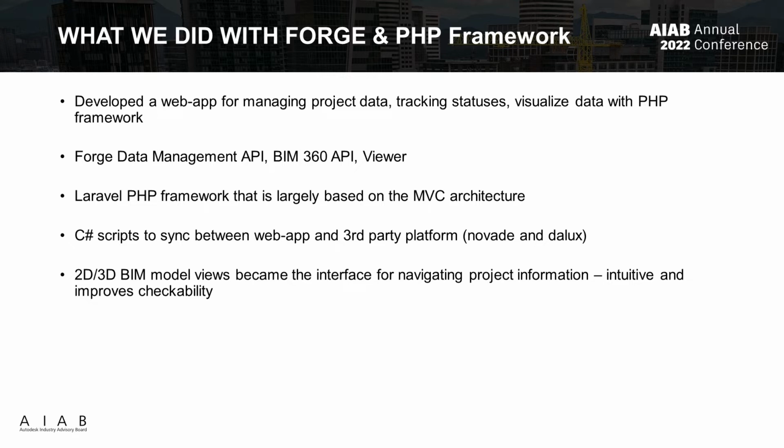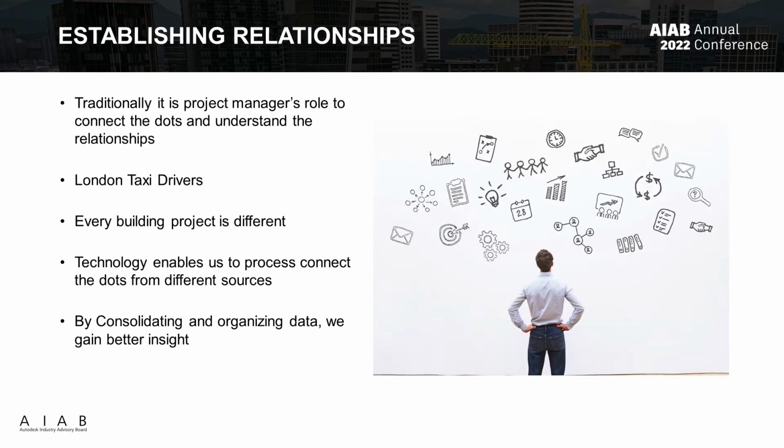We also wrote some C# scripts that synchronize our web app database with Novate and Dalux databases. By consolidating project data on the web app with Forge and C# scripts, the live BIM models that are updated daily by the contractors became a more intuitive interface to navigate project information and improve checkability of contractor submissions.